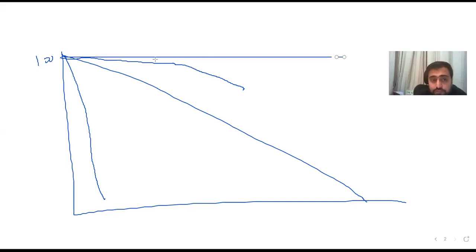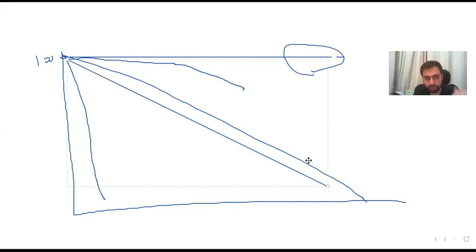And if the question comes how you can have this type of graph, you can have it when you have not prioritized your user stories as high value, high risk. You have only prioritized high value, low risk. So you are giving value, but you are not tackling the risk. If you are tackling high value, high risk, the risk graph would be like this one, the ideal graph. As you move down, the risk will move down. So this is the idea about the risk burn down graph.